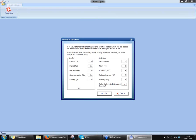Inflation as well, guys. Nine times out of ten, you're not going to go and look at a job tonight and start work tomorrow. There's going to be a period of time before the job starts. It could happen that your prices go up within that time because of inflation. So this is just making sure that you're factoring that into your quote. Because otherwise, if your prices on your materials go up by 10%, you've effectively lost 10% of your profit if your customer isn't covering the inflated costs. So you can set this up and say, OK, I want to kick in at 5% after 13 weeks of the quote being produced.